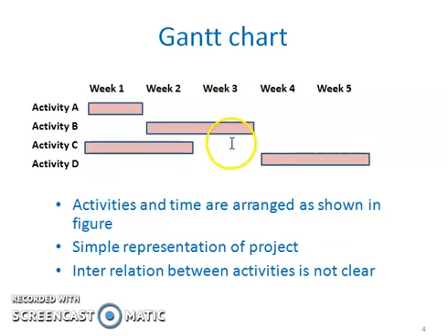The Gantt chart is as shown here. See the activities. Note the time taken by the activities. Major advantage of these charts is simple representation of project. The major disadvantage is that it fails to explain sequence of activities.